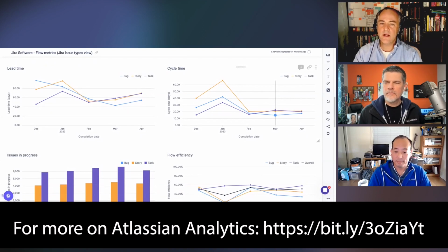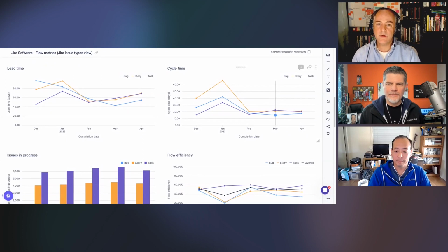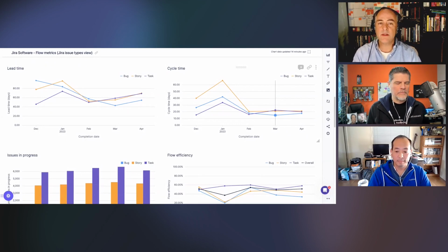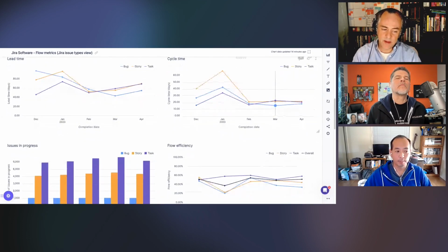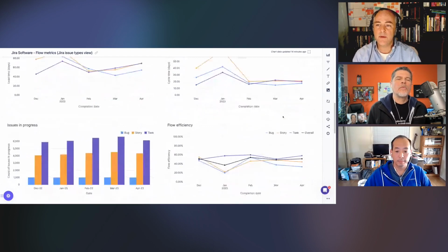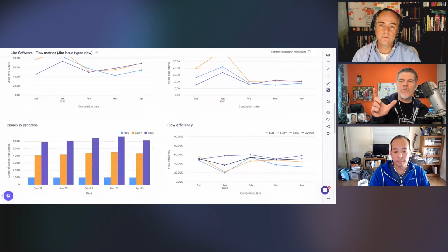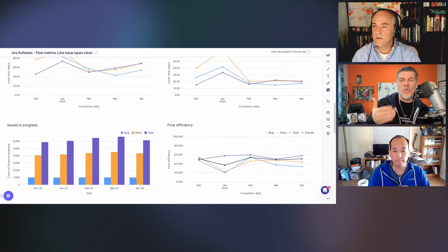So if there's any senior leadership watching this, if you're accustomed to asking teams what the team's velocity is, flow efficiency would probably be a much better indicator of performance. Although if they have things jamming up their workflow, they may not be things they can control. It might be organizational things or other stuff that has to change to help them become more efficient. Right. The flow efficiency is going to show them how much of the full lead time was actually focused on value delivery, actually valuable time versus waiting.